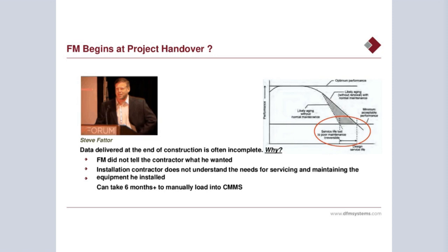And as you can see from the slide on the screen, not being able to start maintenance operations immediately after takeover of a building can have a dramatic effect on the service life of a building. Some of the experiences that were gleaned from that study showed that it can take up to 6 months to manually load information into a maintenance application.